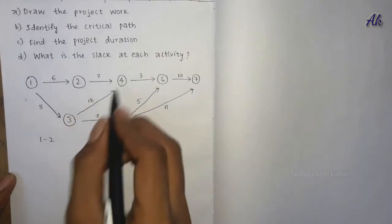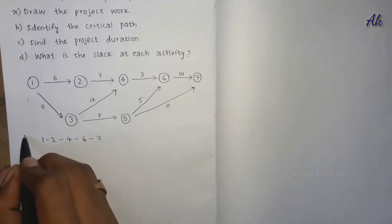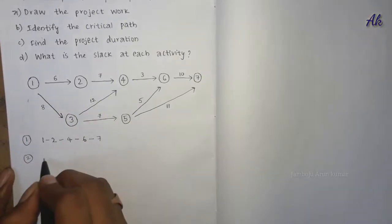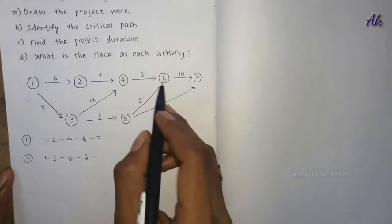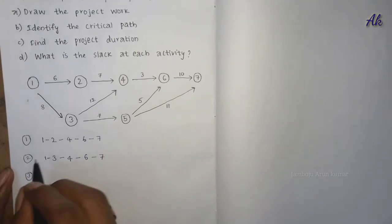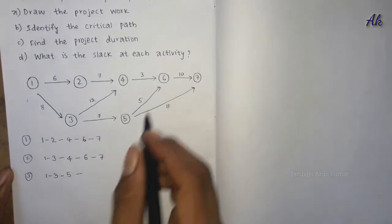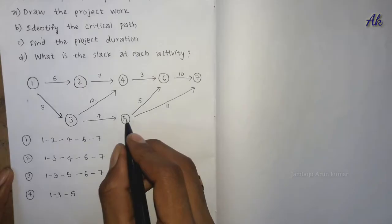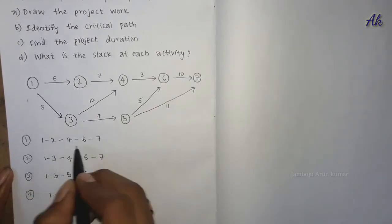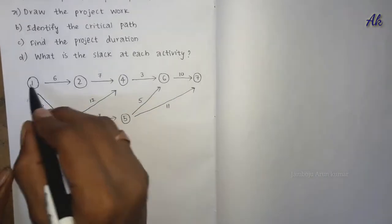Next, we write all the possible paths through the network. Path 1 is 1→2→4→6→7. Path 2 is 1→3→4→6→7. Path 3 is 1→3→2→5→6→7. Path 4 is 1→3→3→5→7. Now we need to find the time taken for each of these paths.